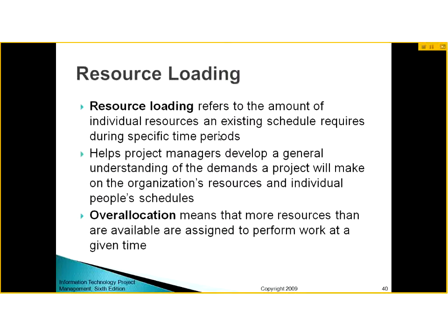Now the next task is resource loading. This refers to the amount of individual resources and existing schedule required during specific time periods. Now when I talk about resource here, I am talking about human resource, the number of people. So when I say resource loading, it means for every task I am loading people to work on it. So how many individual resources you require with the existing schedule to complete the things according to the planned timeline. It helps project managers develop a general understanding of the demands that the project will make on the organizational resources and individual people's schedules.